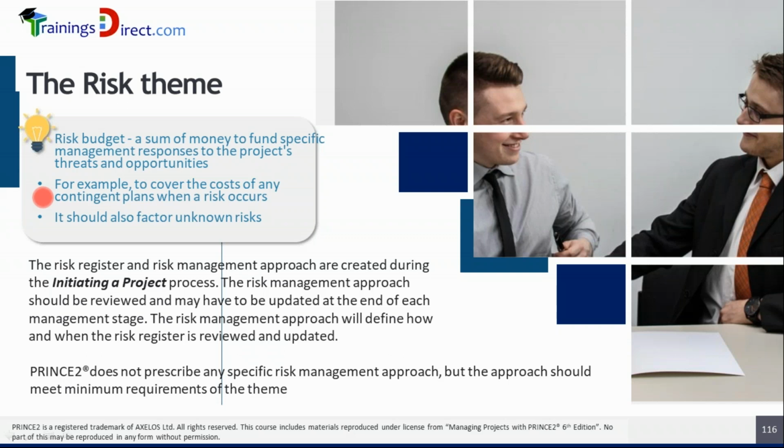So it's important that the project management members identify some warning signs or symptoms by which certain contingent actions can be taken whenever those warning signs or symptoms exceed a particular level. For example, as long as a material price increase doesn't go beyond 10% of its original value, no action may be necessary because then it is not perceived as a risk to the organization. But as soon as it is going to hit the 10% increase mark, then the organization may take actions to prevent it from going above 10%, meaning by procuring the items early before the price goes above 10% of the original price.